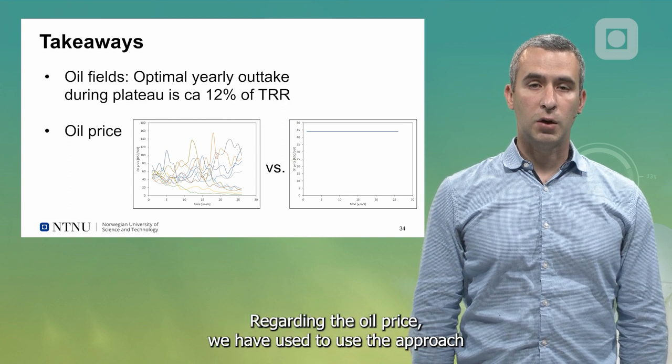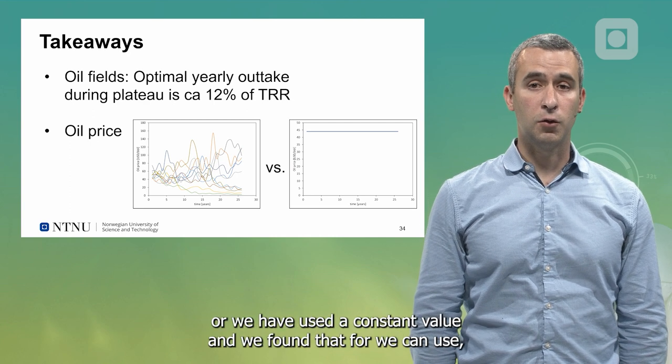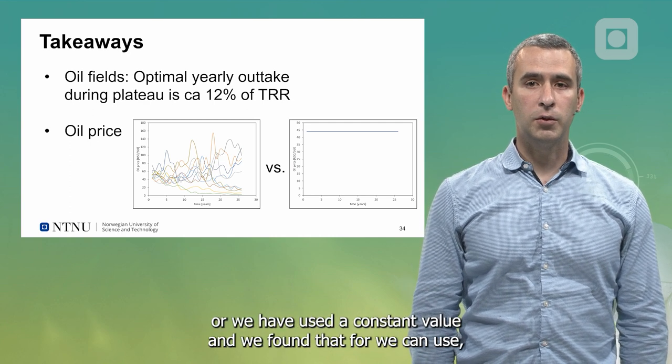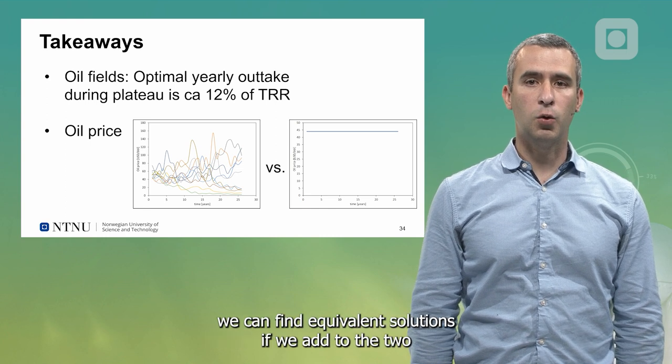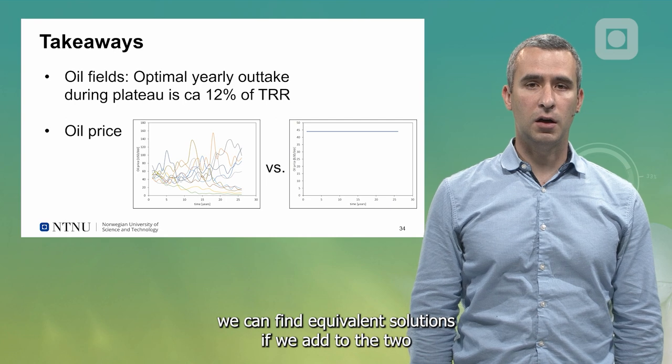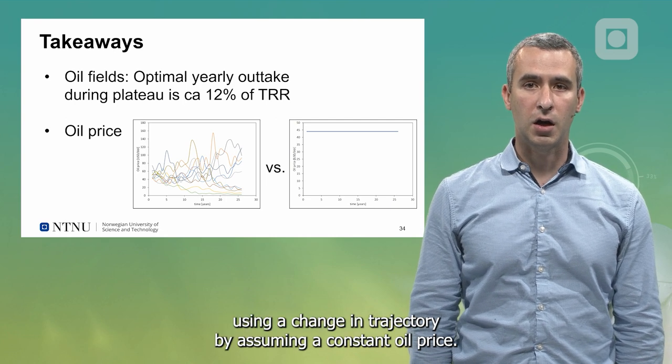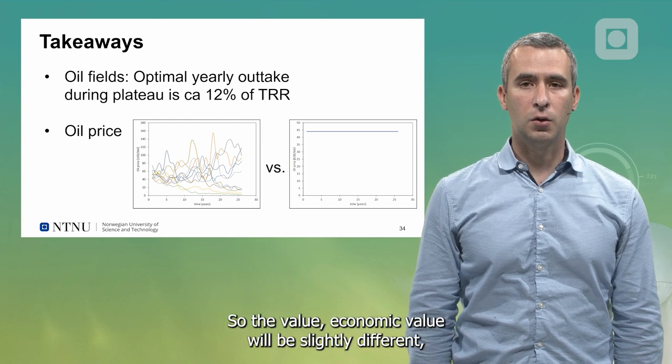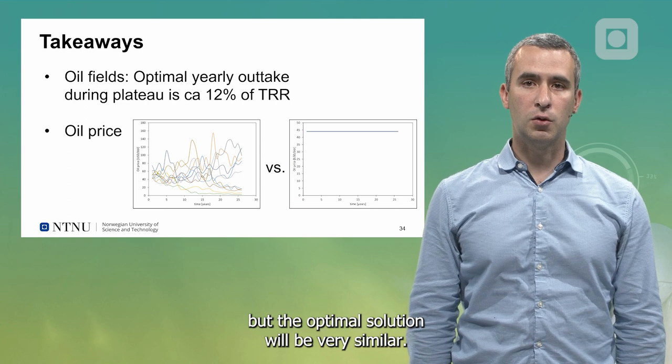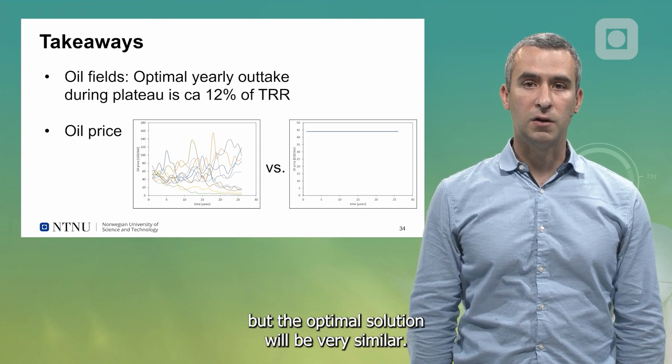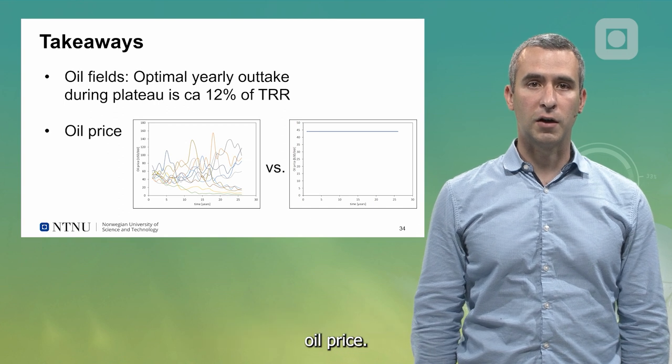Regarding the oil price, we have used, here you see a plot of the oil price with time, and we have used trajectories or a constant value. We found that we can find equivalent solutions to using a change in trajectory by assuming a constant oil price. The economic value will be slightly different, but the optimal solution will be very similar. So actually you could use that as a simplified approach of a constant oil price.